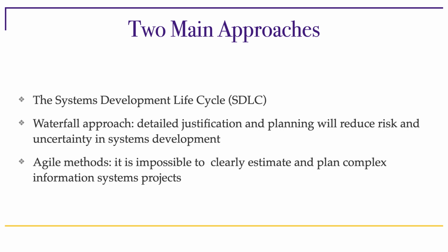The major assumption behind the System Development Life Cycle is that painstaking, detailed, strong efforts early on to justify the project and plan how to complete it will reduce the risk and uncertainty in the system development. So the system development lifecycle calls for a lot of involvement early on from end user and functional managers, particularly in a phase that we will describe later called establishment of requirements.